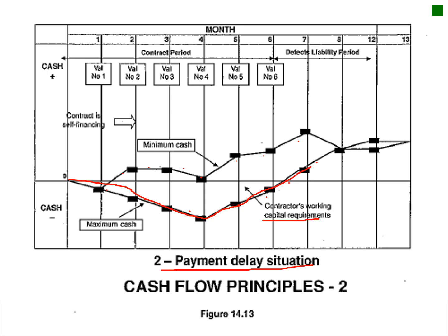This is your worst case scenario, sorry, here at the bottom, and your best case scenario here at the top. That's just the buffer that you usually build in. So this is the maximum amount of working capital that you need to plan for.